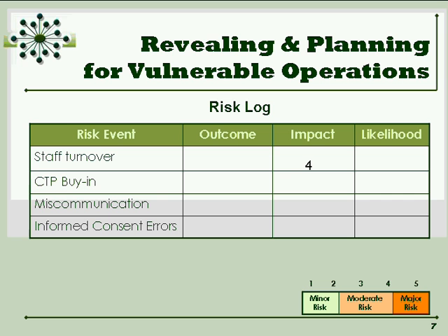And unfortunately, in the nature of the clinical trials that we do, staff turnover is pretty common. I would also rate that somewhere around a 4. And what ultimately happened in this circumstance was we sent someone who had been one of the counselor trainers at the investigators meeting to the site to help train the counselor, but we lost a couple weeks in that transition, and our master trainer, unfortunately, was so busy covering for the RA as well as doing their job as a site coordinator that they couldn't train the counselor, and we lost some time by sort of a contingency plan, but we didn't think it all the way through. We didn't have this formalized process.